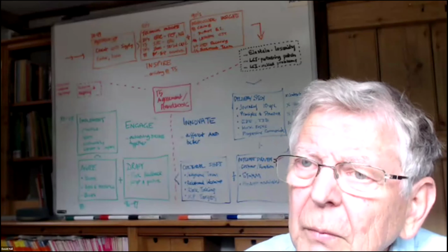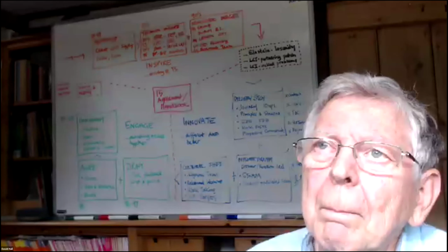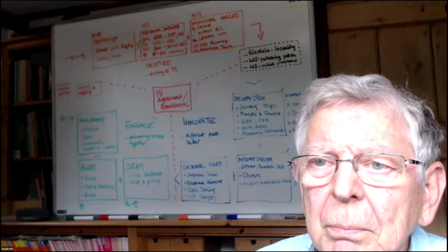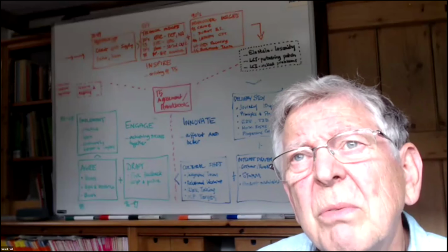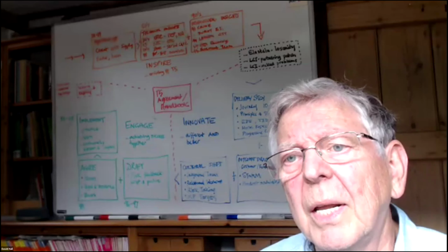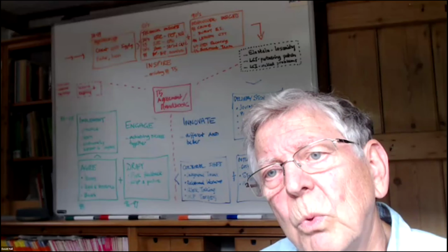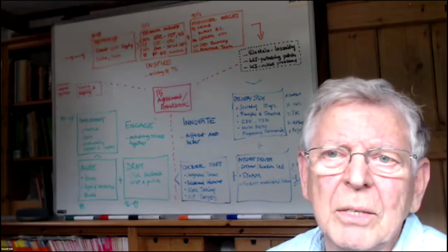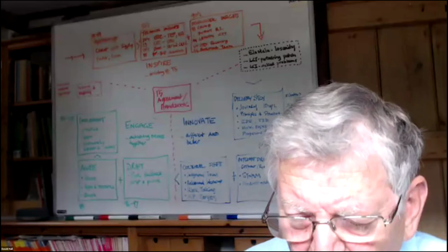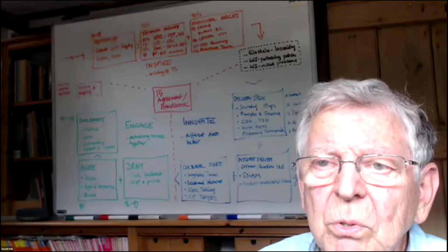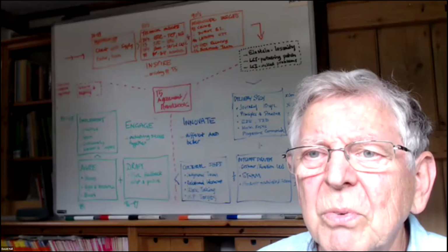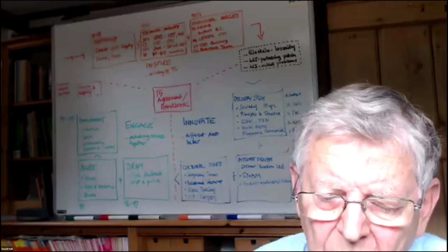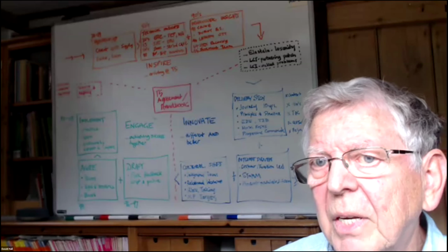And the second one was around wicked problems: that mega projects, mega challenges aren't solved by just scaling up conventional approaches. Yeah. And most of the contracting approaches and delivery approaches were still based on scaling up. Classic Gantt chart, waterfall type approaches, segmented: do a concept design, do a detailed design, procure, and then construct. And actually, that wasn't going to be appropriate. So those really set the scene for the thinking needed to be in terms of a paradigm shift rather than just tweaking what we had. And out of that really came the building blocks of the thinking around the T5 agreement.